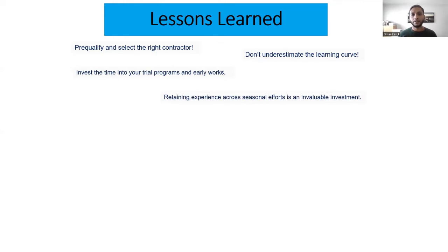Retaining experience across seasonal efforts is an invaluable investment, because as I said before, RCC is only seasonal. We cannot do it in very cold weather or in rainfall events. So retaining the crew that will be working on the RCC structure is very important, because when you retain experienced people, you don't need to train them in future years. That is another investment. Avoid unnecessary changes. Before you go for final construction, make sure the structure you are building has less complexity, and that way you can avoid unnecessary changes in the middle of construction. And do not waste good weather days. It's very important. Rain is not helping us, and cold is not helping us.